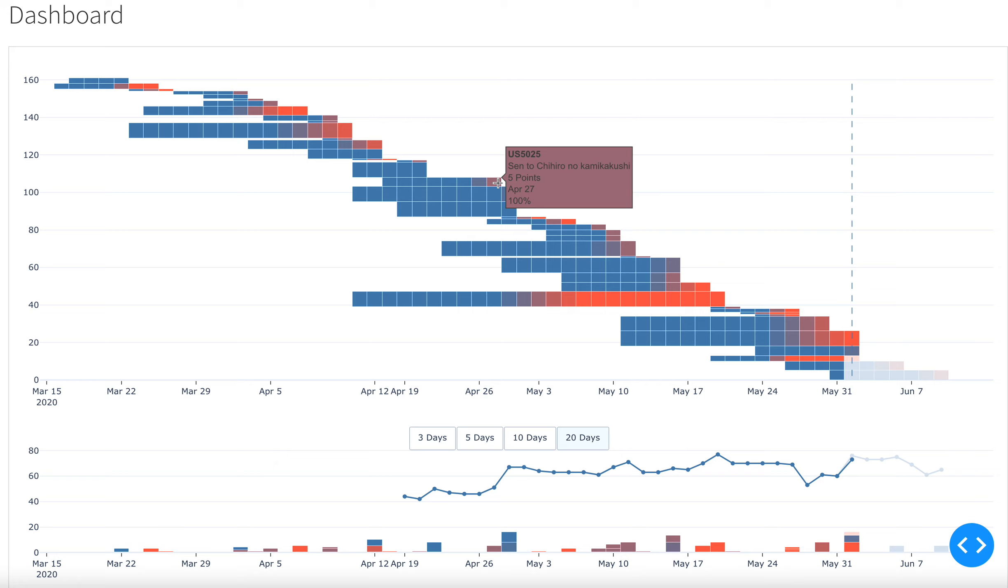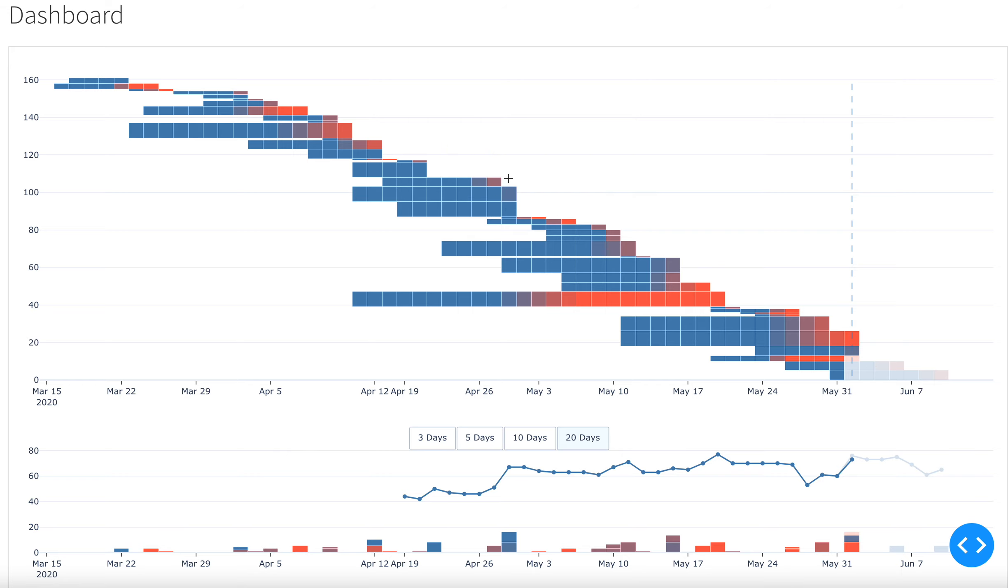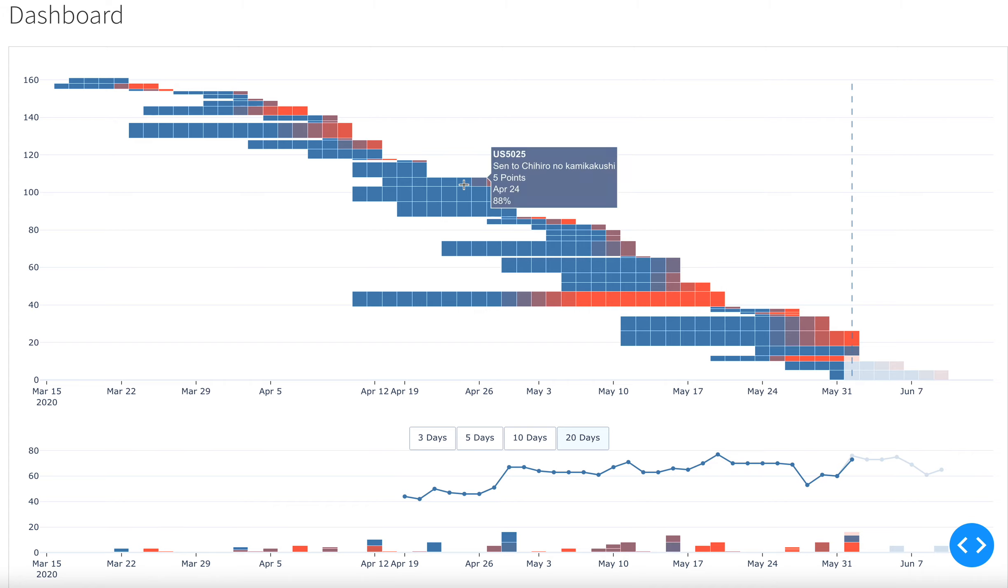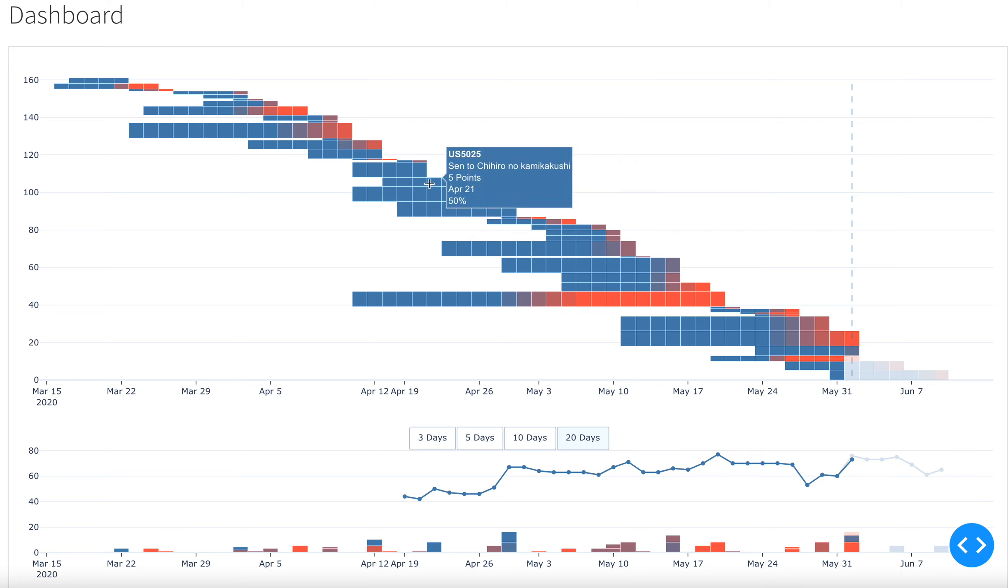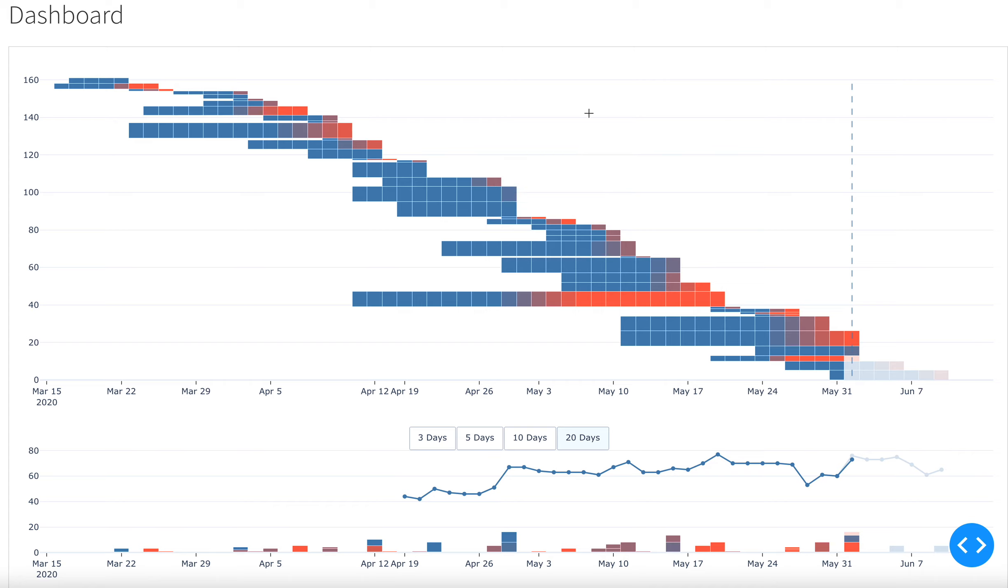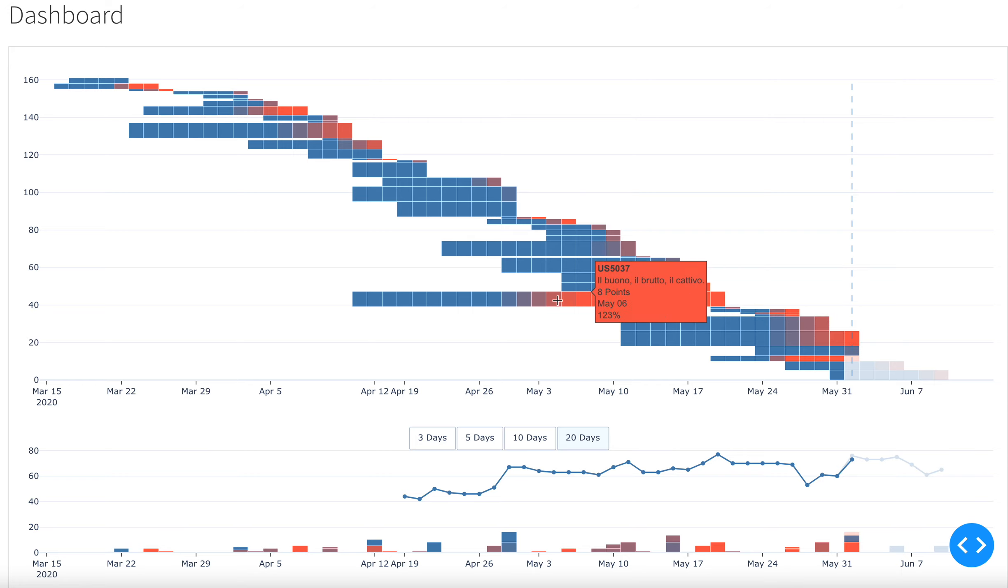For example, in this instance here, the story was a five pointer, was completed exactly as predicted on day one, two, three, four, five, six, seven, eight. On day eight here, it was 100%, it used 100% of the predicted workdays. In this instance here, it used 192. So almost twice as many workdays as predicted.